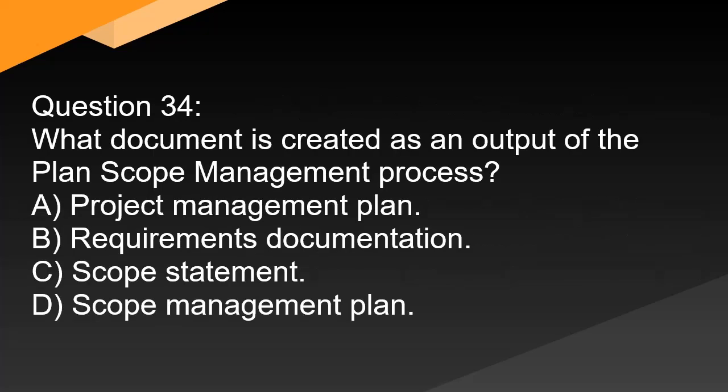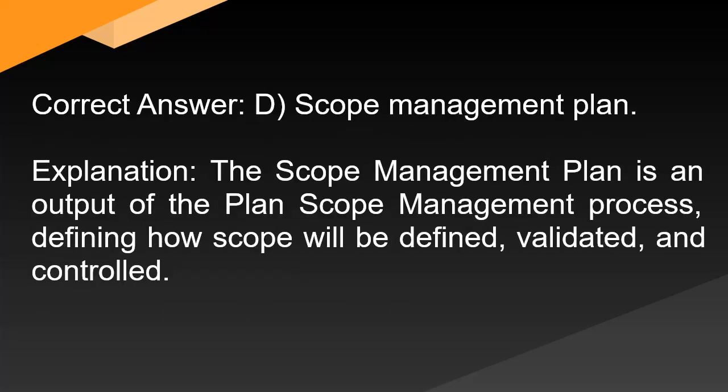Question 34: What document is created as an output of the plan scope management process? A. Project management plan. B. Requirements documentation. C. Scope statement. D. Scope management plan. Correct answer: D. Scope management plan. Explanation: The scope management plan is an output of the plan scope management process, defining how scope will be defined, validated, and controlled.